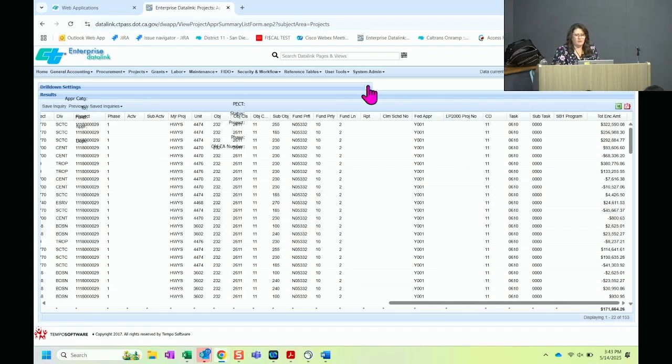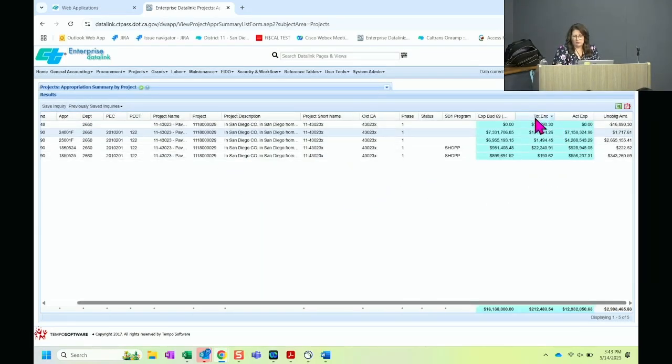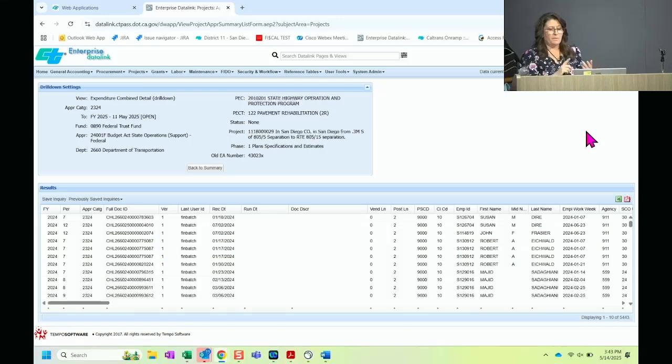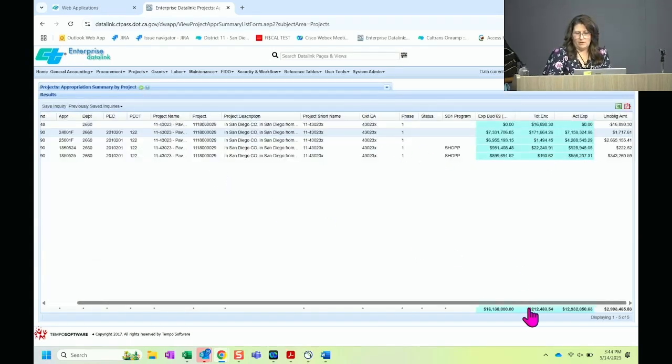Okay? And then the same goes true for the expenditures. So as we liquidate the encumbrance, the expenditures go up. But on top of that, if you wanted all expenditures, again, drill down. This is going to include all payments that you liquidated against your encumbrance, plus anything else: labor, TECs, license fees, went to a conference, right? Any object code that's hitting your project and your phase with federal funds, the journal is going to show you everything, okay? And then the balance, open, unobligated, right?